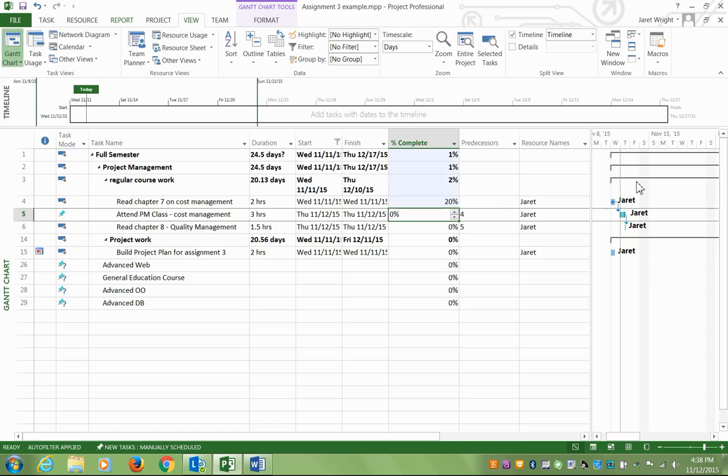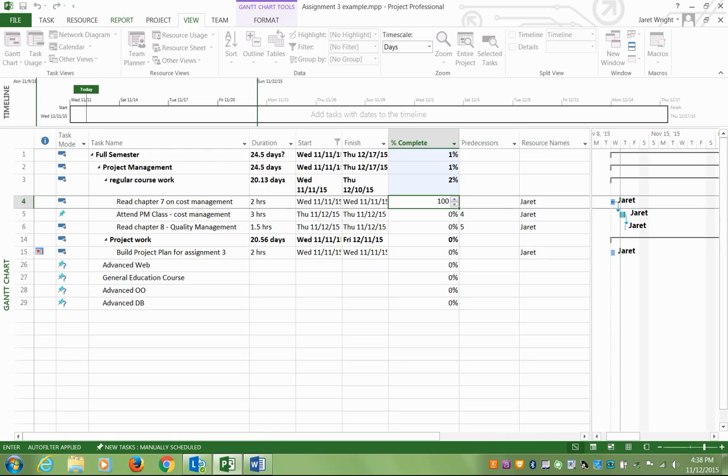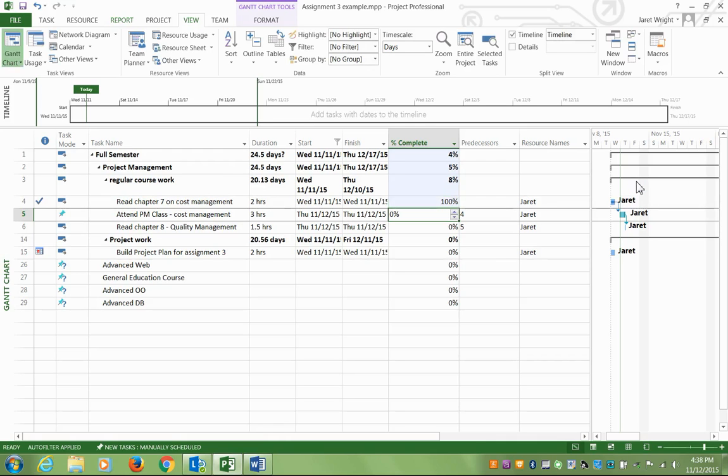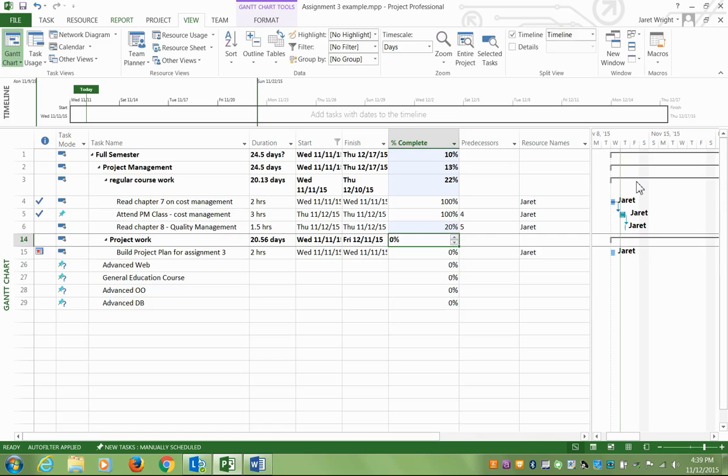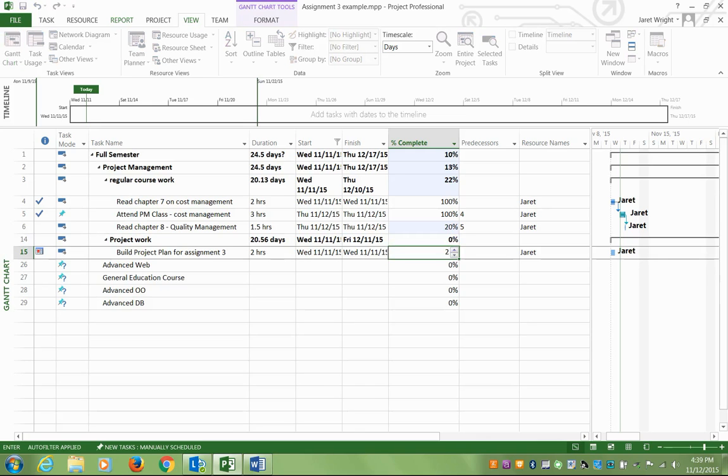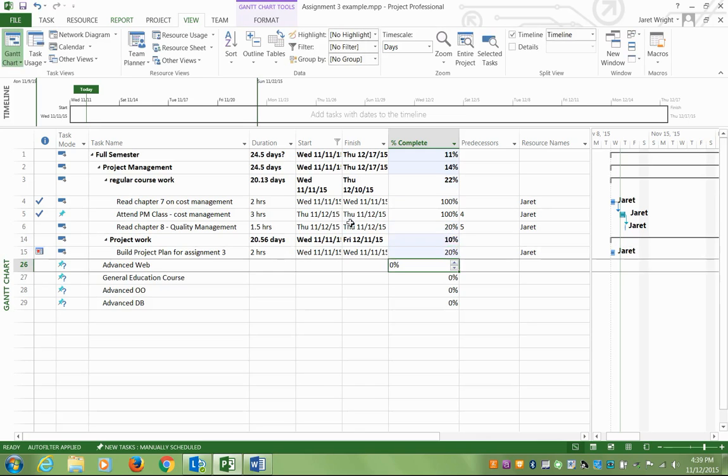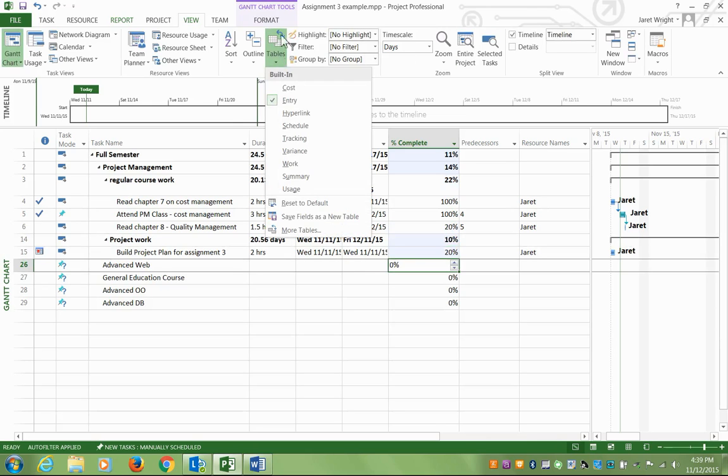Let's add a column called Percent Complete. What I want you to do each week is to go through, and if you've started a task, but you haven't finished it, I want you to say you're 20% complete. If you have finished the task, so for example, if I've read the entire chapter and I feel good about the content, I'm going to mark it at 100% complete. I attended the class. Of course, you were there. No one would dare skip my class. So that's 100% complete. And I could have started reading Chapter 8. So I'm going to give that 20%. And then I have my project plan. I've only done one of the courses in my project plan. So I've started it, but it's not complete. So I'll put it at 20%.